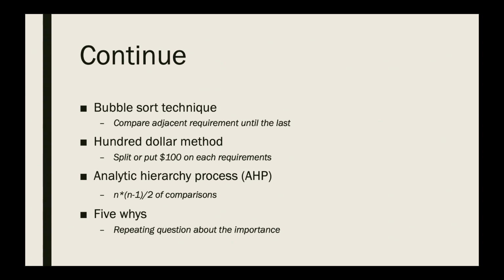And the last method is called the 5 whys. It is used when stakeholders want to add in additional requirements that weren't in the original plan or don't fit in the logical argument of the business. Then the requirements will be rapidly questioned, usually 5 or more times, until the importance of the requirements has been established. This method could be used for a product that deals with the market, which involves rapidly changing demands from customers, such as shopping apps or adding new features on the software.